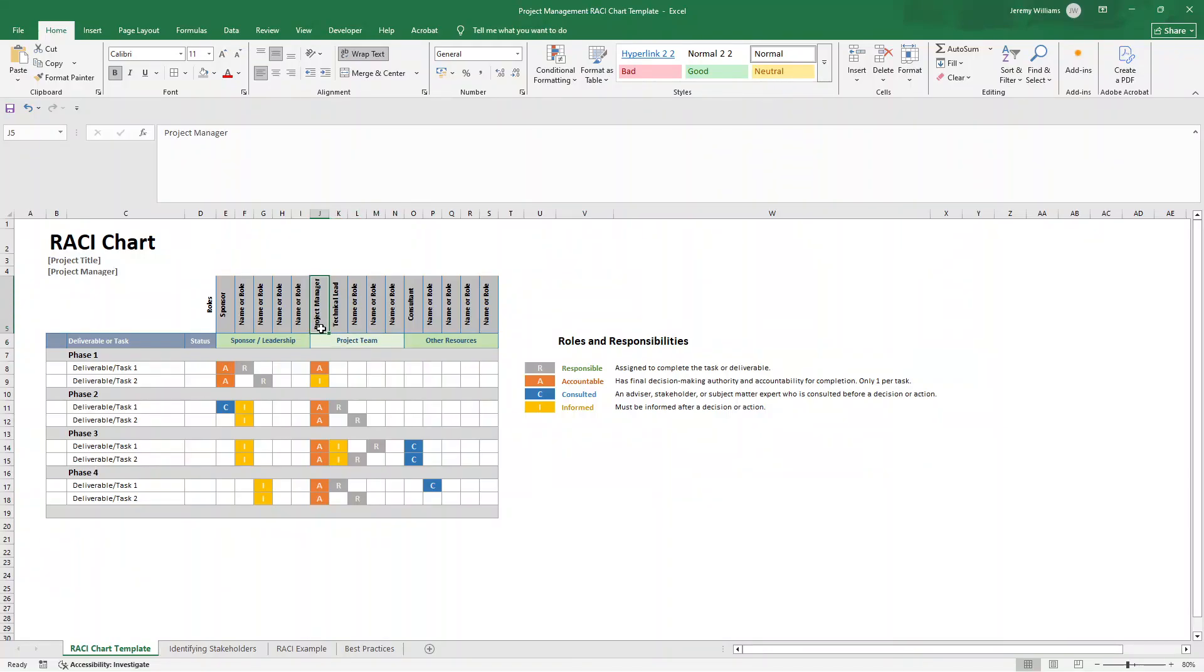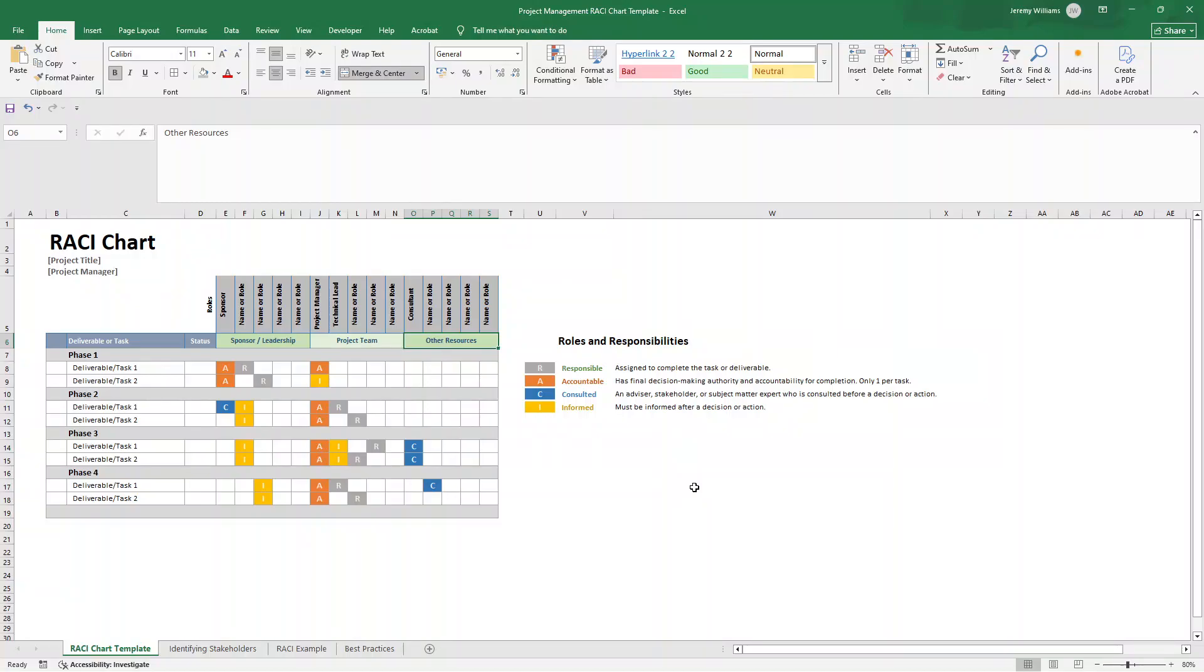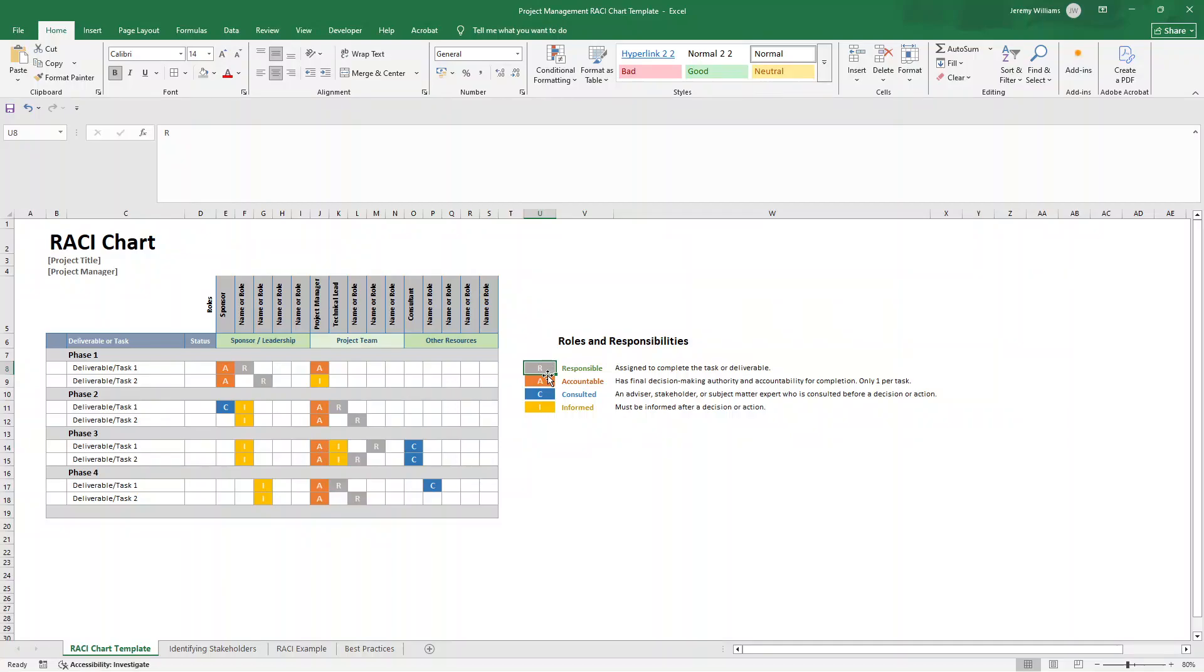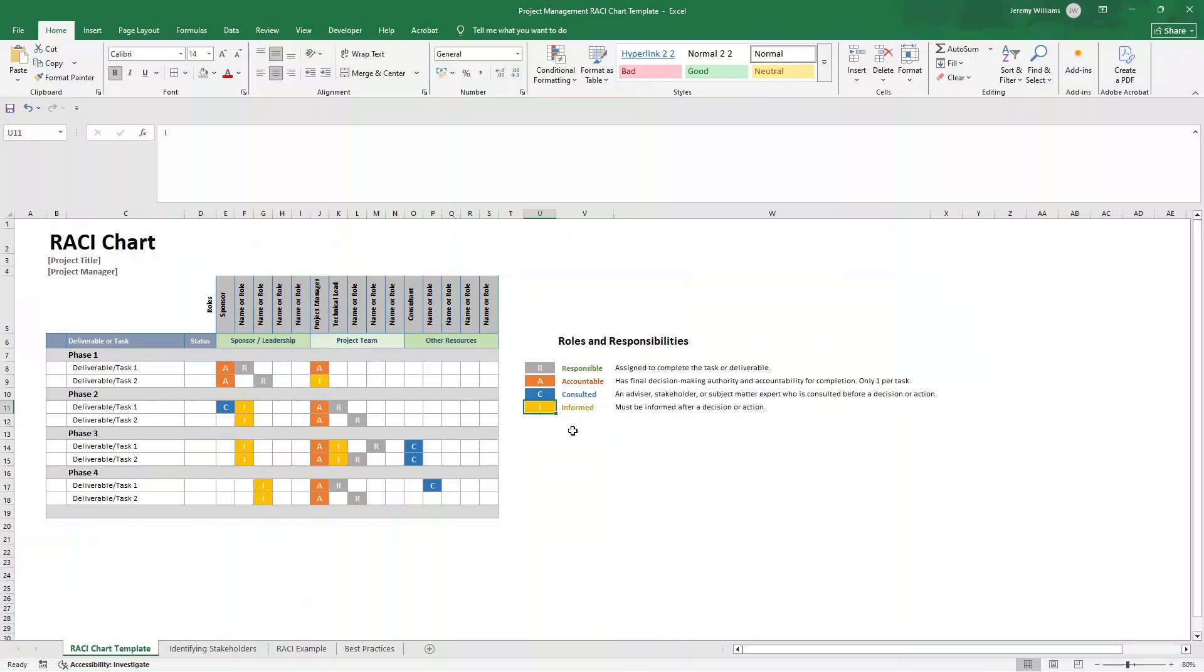Then you need to classify other resources. These will be your subject matter experts, end users, support functions like IT and HR, perhaps even external vendors or consultants. So once you have lists of stakeholders and the categorizations, you can then assign your RACI for each task. You can go through each task and essentially identify who will do the work, responsible, who has the authority to approve it, who's accountable, whose expertise do we need, who's been consulted, and who needs to know about this, informed. Review the chart once done with your stakeholders before finalizing. This will catch gaps and prevent pushback later.